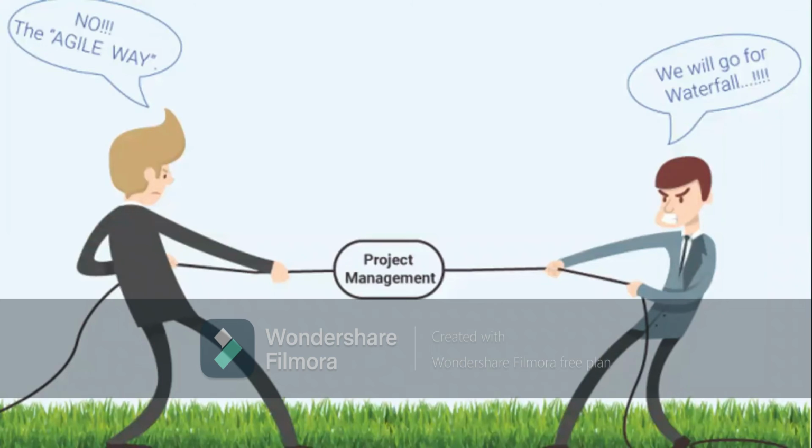And here's the point: in a lot of the market today, you're still applying traditional waterfall. Oh, that's bad, you should be going through Agile. No, you should be using RBM, results-based management, that's used by the UN, United Nations, right? So it's not a point of whether to use Agile or Waterfall. It is about the sort of project. As I was saying, if the project is well known to us, then Waterfall will be great. If the project is not known, the requirements are not clear, there are ambiguities, then Agile will be perfect.